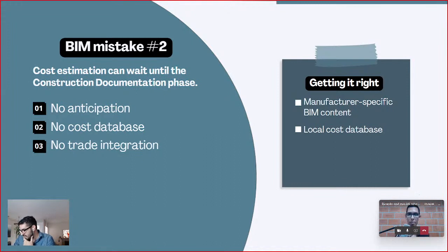Sure. Adding to this point, even with the BIM methodology, it is common to see architects or AEC professionals wait until the construction documentation to start with the cost estimation process. And hey, you already have the technology, which is BIM, that allows you to start the cost estimating process since the initial phases of the project. So you don't have to wait until the CD in order to know how much the project would cost.